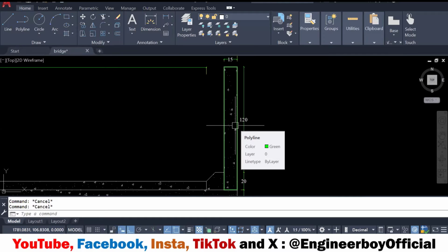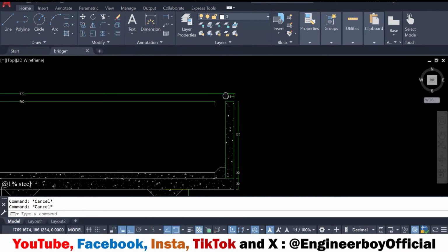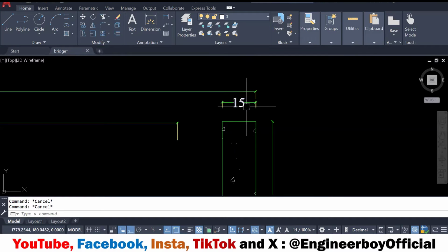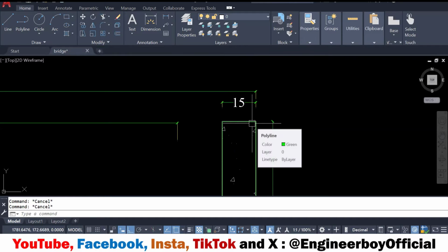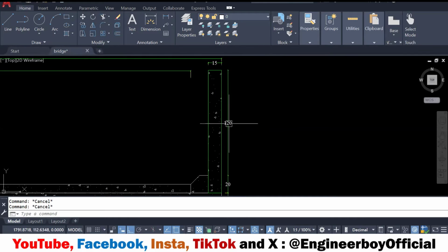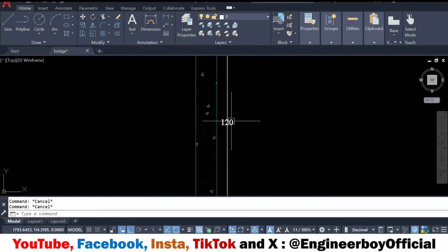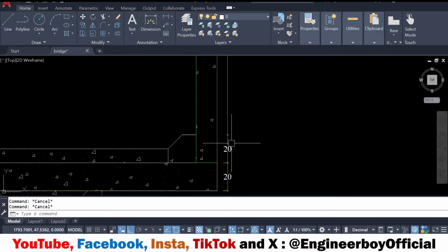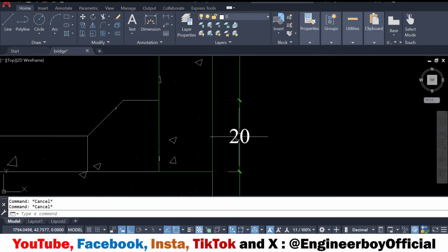Now, the railing posts, you can see its width, which is 15 centimeters. It means these are, you can say, square. So 15 times 15 can be the cross-sectional area. And then we will take its height, which, if you see, is 120. And of course, 20 over here if you consider this as well. So 120 plus 20, this can be taken. If you just ignore this 20, these can actually be taken with curve as well. So this is going to be very simple.